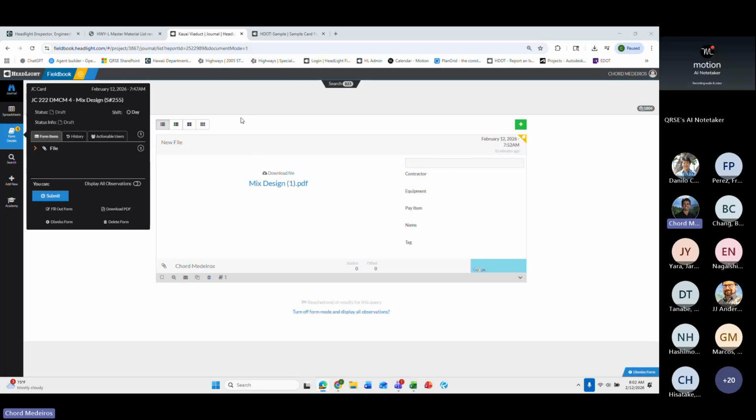So obviously at the end of the project, it says rejected. You don't see an approved submittal that is on top of that. So then the lab asks you, well, okay, this submittal was rejected. How did you reconcile that? Then obviously you put in the notes, you say, well, okay, here's in our progress payment under pay item 301, 401, that we paid at a reduced rate because the compaction fell within the sliding scale amount of 90% to 92%, where it wasn't full on rip and replace, it was paid at a reduced rate.